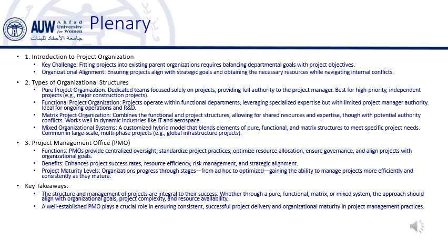Supportive PMOs that provide tools and guidance. Controlling PMOs that enforce compliance with project management standards. Directive PMOs that manage and execute projects directly. We explored how the PMO helps ensure that projects align with organizational strategy, manage resources effectively, and mitigate risks.